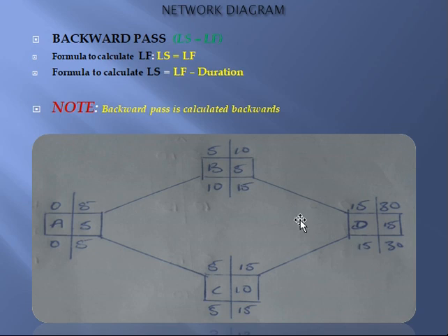Then also activity D is dependent on activity C. You do the same thing. You simply bring this late start and make it become the late finish. You understand? The same reason. That is to say, for activity D to start on this 15, it means activity C has to also finish latest on the 15th for activity D to be able to start. So that's why we are having 15 and 15 as the late finishes for activity B and activity C.